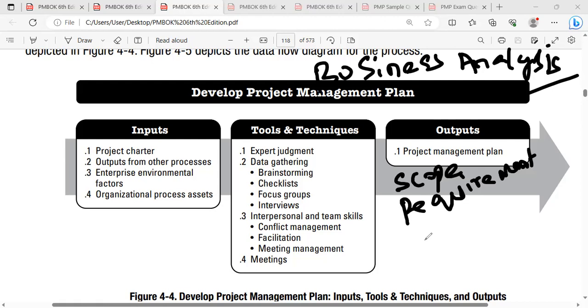Correct. The estimation or tendering costing team. Tendering team, right? So the tendering team will be pushing a representative to the client or the owner to collect the complete specifications. Okay. Now, in the adaptive project, Ms. Kala, can you just give me the information? Once the requirements are completely gathered, they will not be called requirements there. They will be called user stories, right?